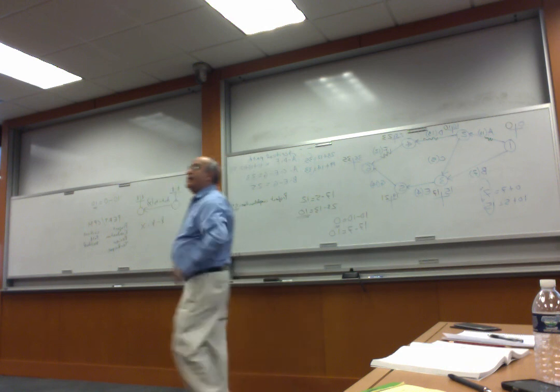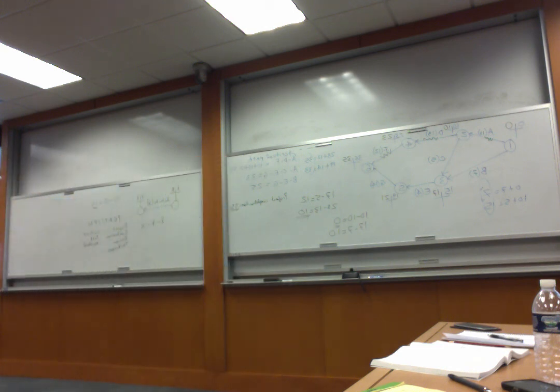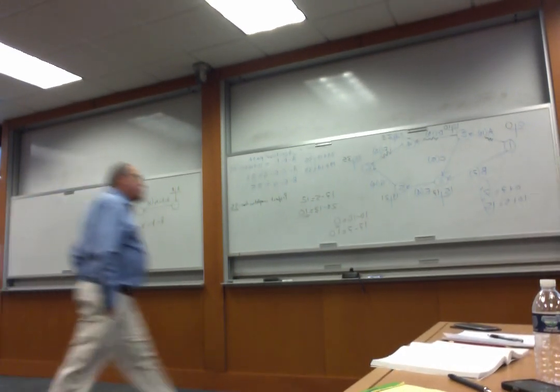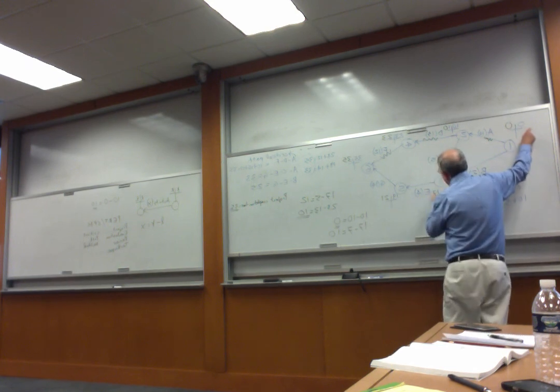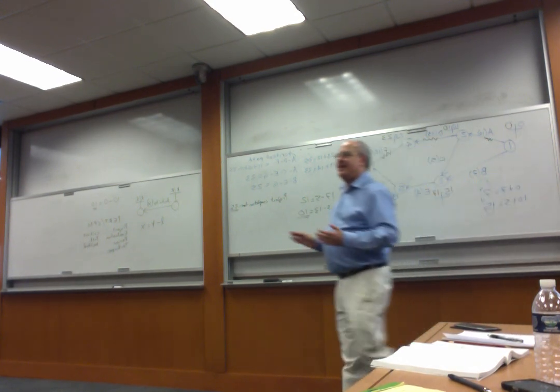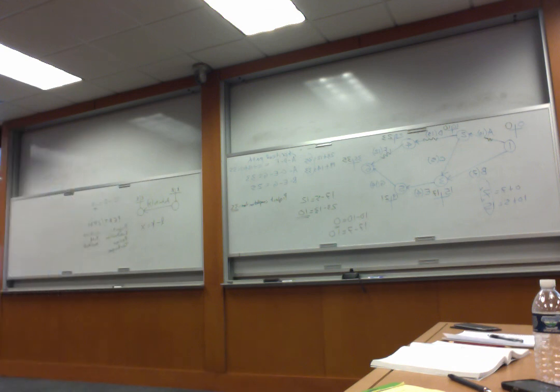Why did you use the 17 just as slack of 10 instead of 15? Excellent point. That's the rule. The rule is the smallest value on the left, the highest on the right. It's just a definition. For 15, there is an interpretation, but I don't want to go into it. But that's the definition. To determine the slack, we use the highest number. For example, in this case, back to B: 0, 17. 0 is the smallest, 17 is the highest. So 17 minus 7, which is the length of B, the slack is 10.